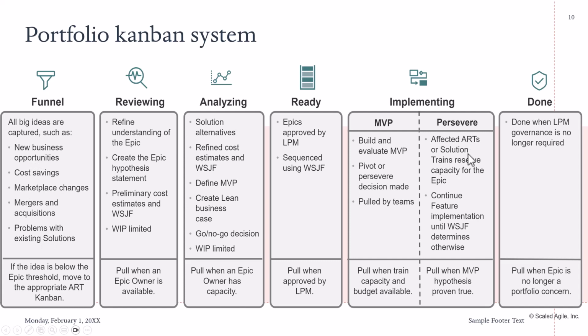existing solution, especially if you want to modernize your infrastructure. There has to be a lot of customer pain points from the customer support team. So some of those epics, you start working on them. You have to assign the agile release train or maybe solution team, and they start breaking down those epics into features. And for those features, during PI planning, you have to start planning on those ones, and also start writing stories so that you can start implementing those ones.